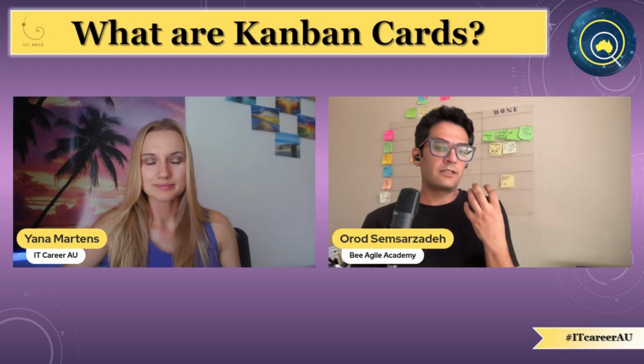As I mentioned in our first episode, Kanban means signal in Japanese. So when we want to design a card, we need to make sure that looking at this card sends us a signal to understand how long it's been in progress, if it's blocked by someone else or not, how long it's been blocked, is this ready for the next person to start, and maybe what type of work we have.